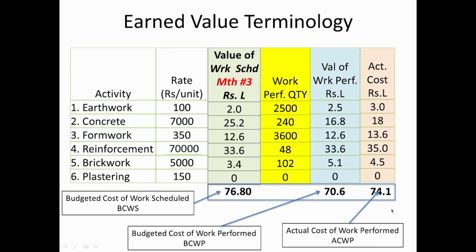So we can see that earned value, like we had discussed earlier, gives us an insight into the project, both at the project level and at the work package level. As we go into more detail in the work package and the work breakdown structure, we might be able to get down to activity level, in which case I do not need to use earned value, I can use my direct monitoring approach of quantity versus total quantity, productivity and things like this.